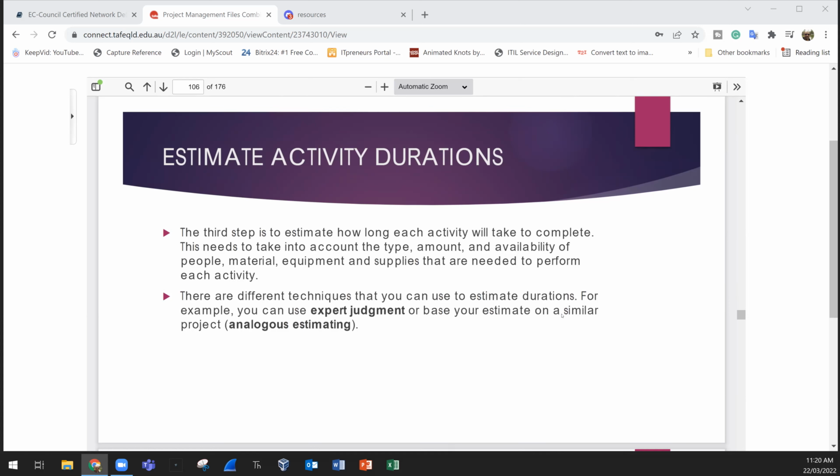When we calculate the duration, if we are saying, for example, I'm starting this task on the 1st of April and finishing on the 3rd of April. So how long will this take? Can anyone tell me how many days? 1st of April till the 3rd? 3 days, not 2 days.